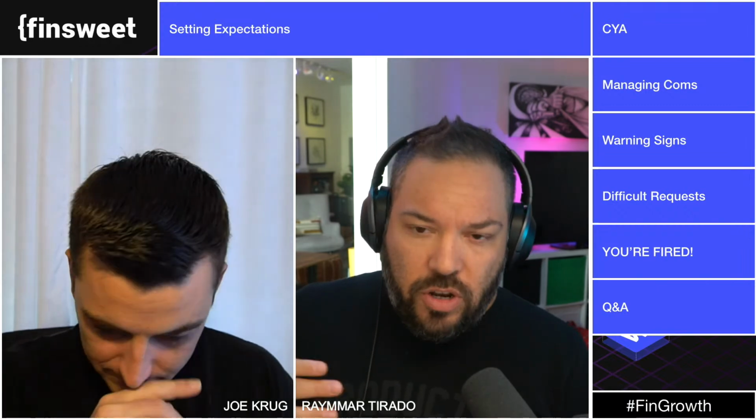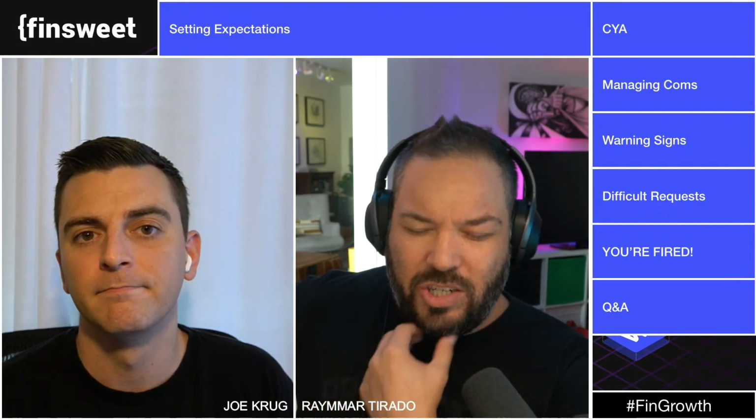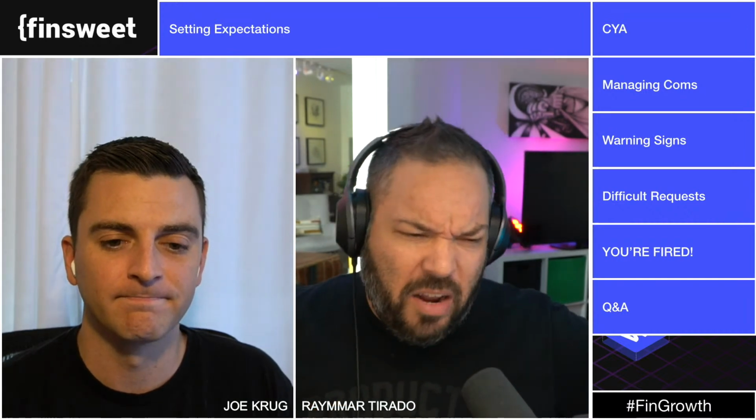And so you shouldn't get in the habit of just saying, yes, we can handle that, or no big deal, we'll just add that on at the end, or whatever it is, because a lot of times you end up stacking up work for yourself that at some point you're like, oh no. And then it's 3 weeks from now, 4 weeks from now, from when you said yes to that person, and you actually have to do this extra work. And now you start thinking, I'm not getting paid for this. This is dumb, right? And now the quality of your work starts diminishing because you start resenting the work that you have to do that wasn't scoped out at the beginning of this project.